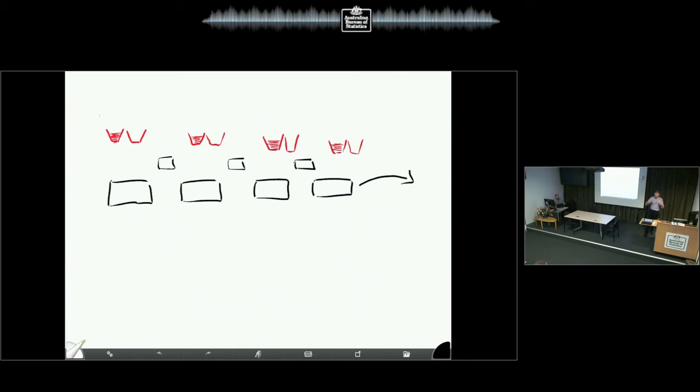And so they were limiting work in progress because it's much more effective if you limit the amount of people in there. A similar thing happens now in Auckland in New Zealand on the motorways. Obviously, a 100% utilized motorway is not that good because everything's 0% flow. Everything slows up. And the optimal is around about 80%. So all of the on-ramps in New Zealand have traffic lights which automatically stop the cars going onto the motorway. So we continually have that flow. And that's something we need to think about in our resource management, that we think of a BA or a tester thinking, how much do they cost per year? We can't have them 80% utilized. But that's actually the sweet spot, 80% for the way people work.